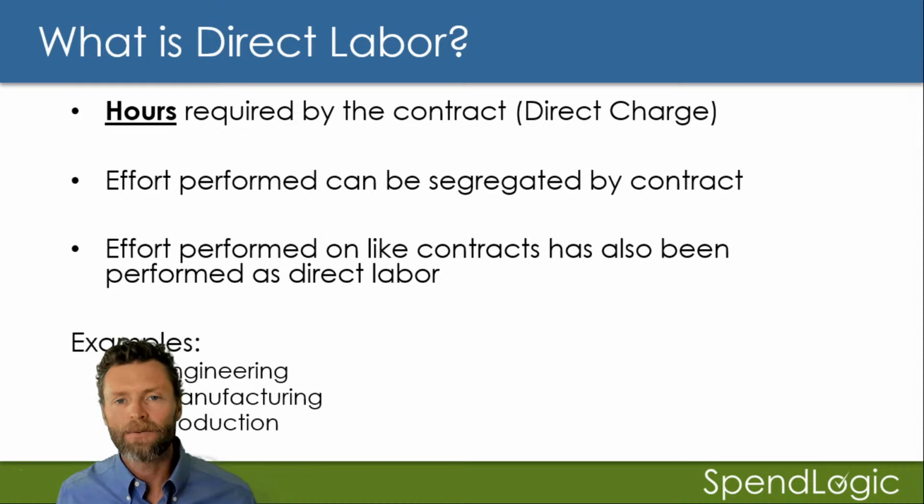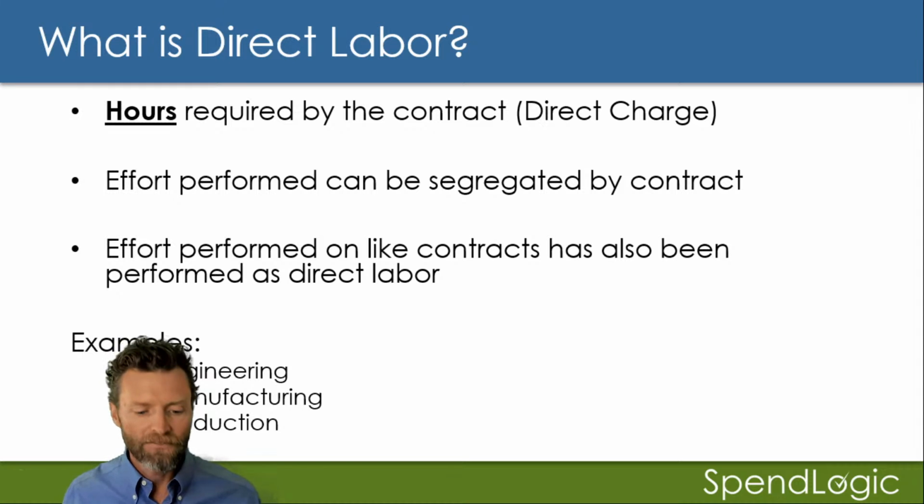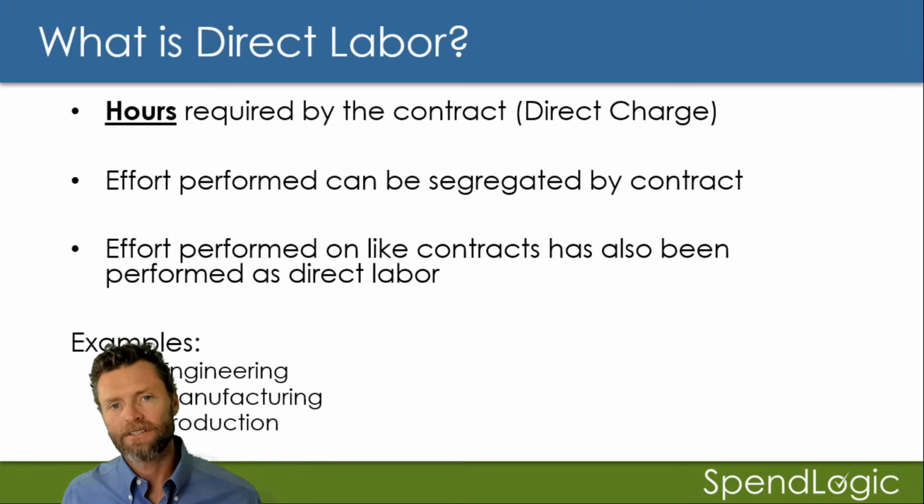So direct labor estimate. So here we go. First and foremost, what is considered direct labor? What we're talking about here today is hours, okay? They may have told you that they have $10,000 in direct labor. Well, that doesn't tell me anything. In a cost analysis, I need to see the hours separated from the rate or the dollars, okay? So what we're talking about here today is just the hours.